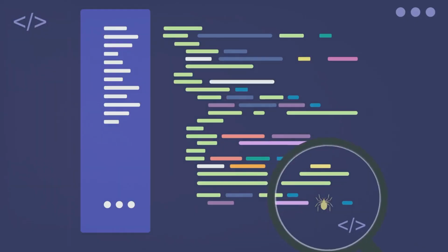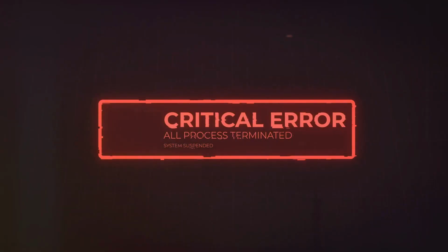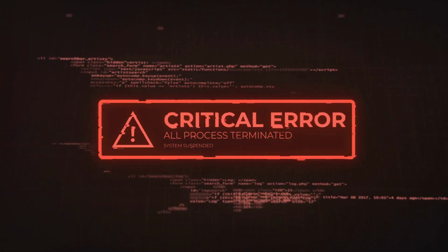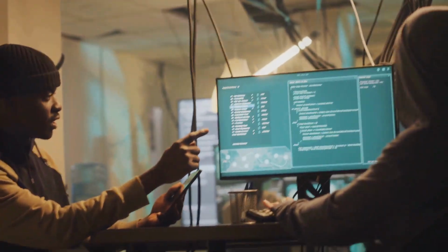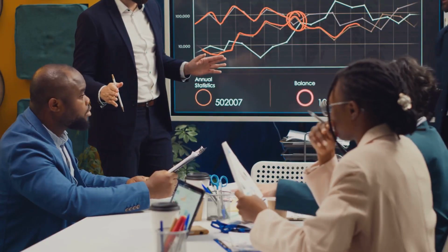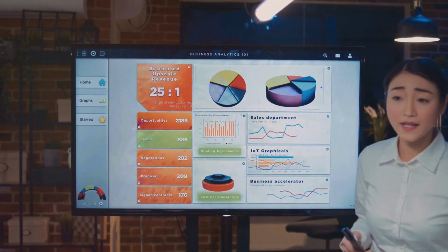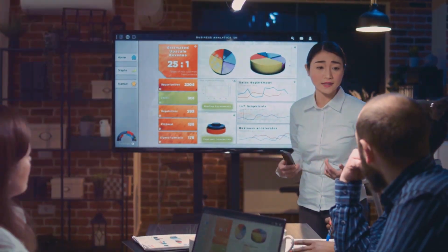Once identified, defects are recorded in a defect log or bug tracking system, along with details such as description, severity, priority, and steps to reproduce the issue. This documentation helps teams track defects, assign responsibility, and monitor the progress of defect resolution. Clear documentation also helps in analyzing recurring problems and improving processes.